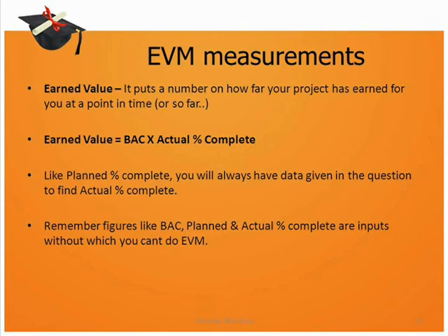If you remember, we had 16 weeks and the question was what is the planned percentage complete at 4 weeks. So we knew that the planned percentage here is 4 by 16. In a similar fashion, you will have data given and you will infer these values, and based on these only you can do further calculations for EVM.